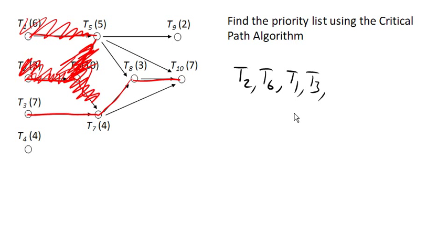So now we imagine we remove that, and we say what's my new longest path? Well, my new longest path is now here. 5, 3, 7, which is longer than 4, 3, 7. And so task 5 becomes next on my critical path list.